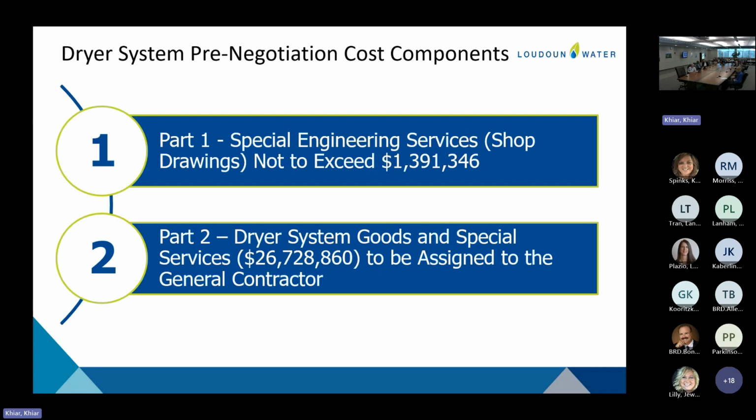that would again fit into the larger design. If you didn't do the design now during the larger project design, it would have to be done during construction. Okay, so it's better to do it now when you have the time, rather than during construction when time is of the essence and things are moving faster. And it could cause a delay. Could. So it's better to be upfront with this vendor design, and then moving on to part 2.